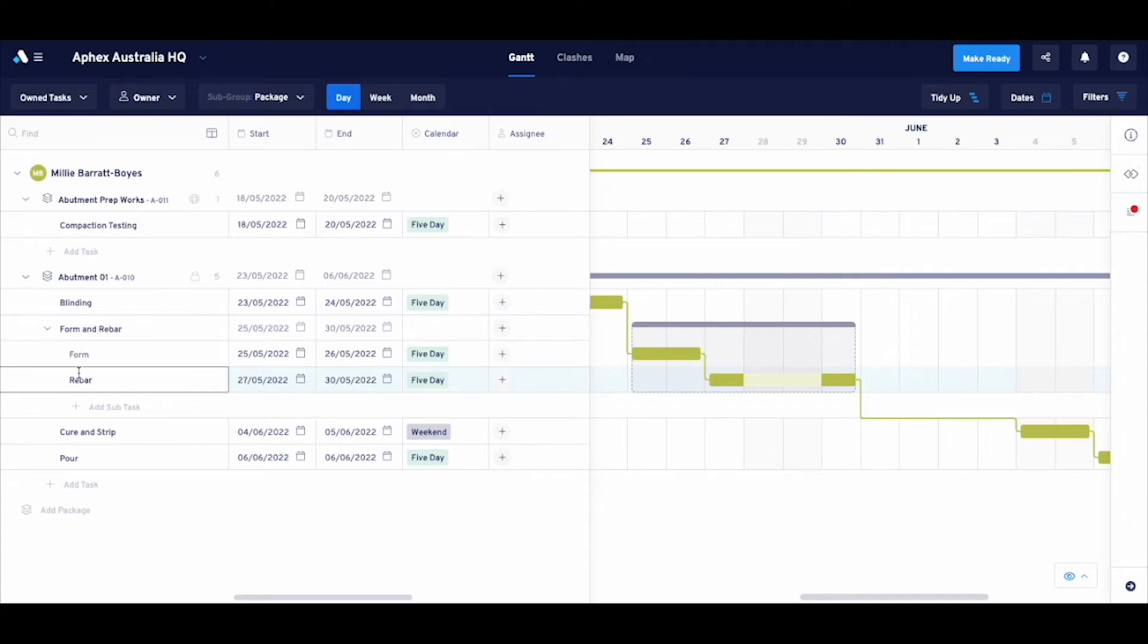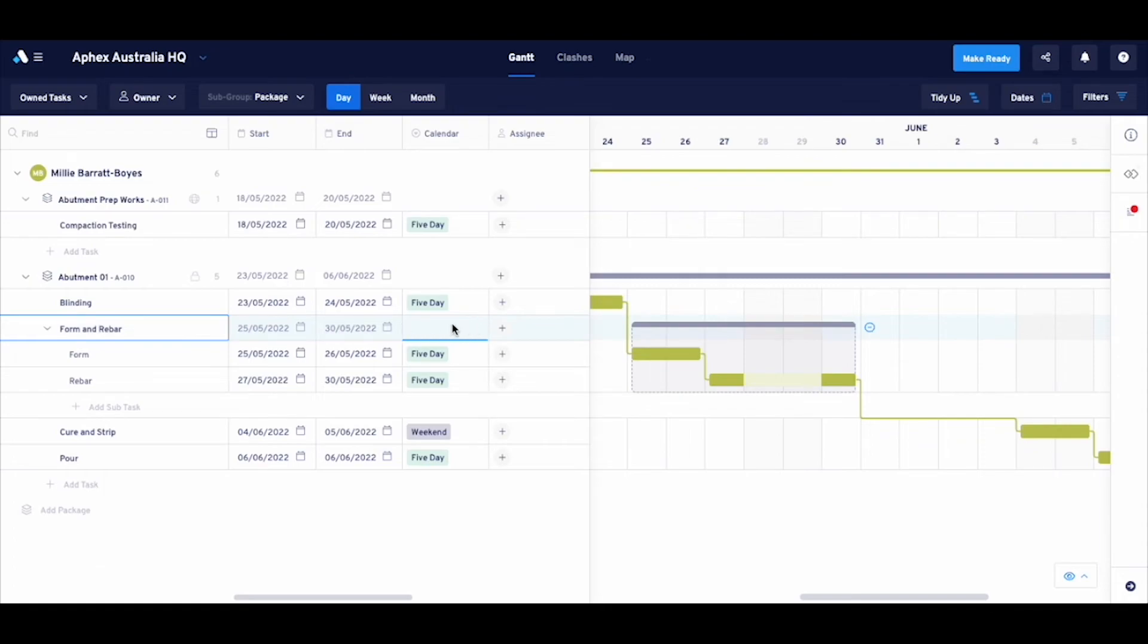You'll see now that the information assigned to the original or parent task has been passed on to the subtasks. With the exception of package and WBS, no information can be assigned to the parent.